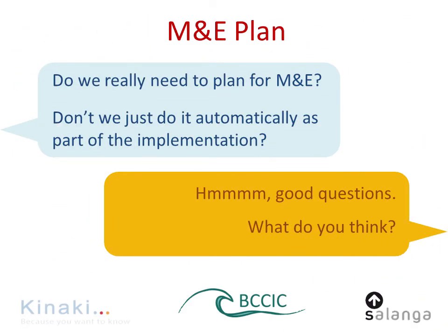So in the previous slide, we talked about the monitoring framework or the measurement framework, PMF, which defines how we are going to track that we will be there. We also talked about M&E systems and the M&E concept or framework. But there is one more step, the M&E plan. That usually comes in at the beginning of the project when we do implementation planning, or we have already done the implementation planning and now we try to decide how we are going to measure it. So the PMF will help us significantly to know what we need to measure and how.